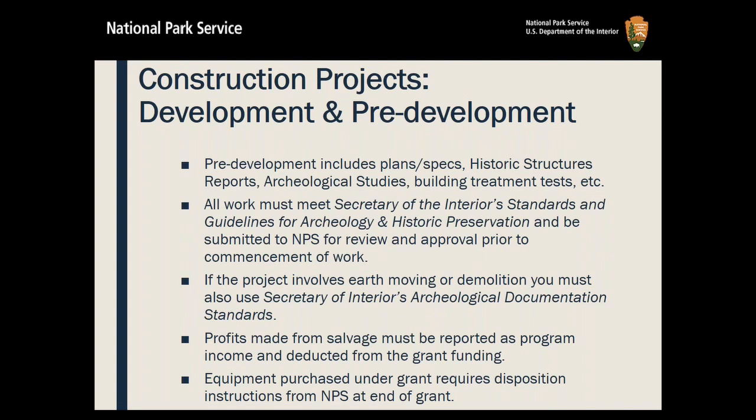And that means we don't expect you to be the experts. Some of you on the phone, of course, are, but you would submit them to us for review and approval prior to beginning. If the project would involve any sort of earth moving or demolition, for instance, say you're doing some new driveways or new parking for ADA, you must also use the Secretary of the Interior's archaeological documentation standards. Profits made from any salvage have to be reported as program income and deducted from the grant funding. It's very rare, but sometimes happens.